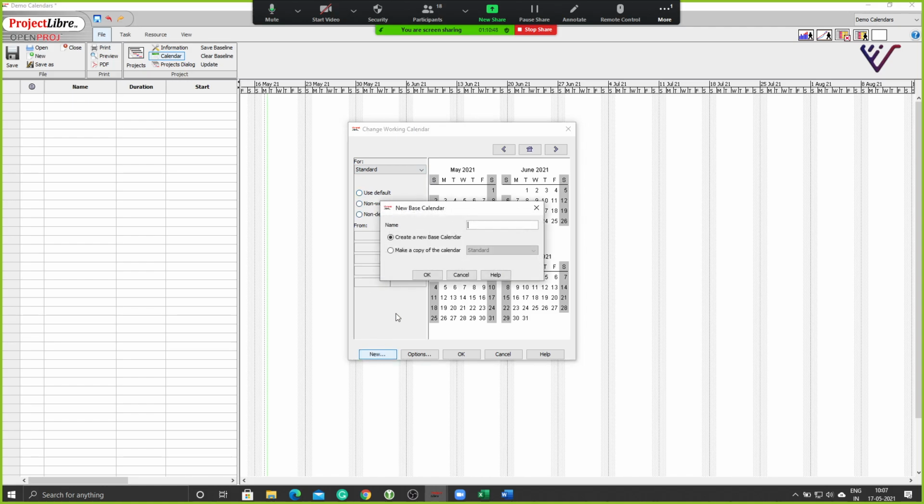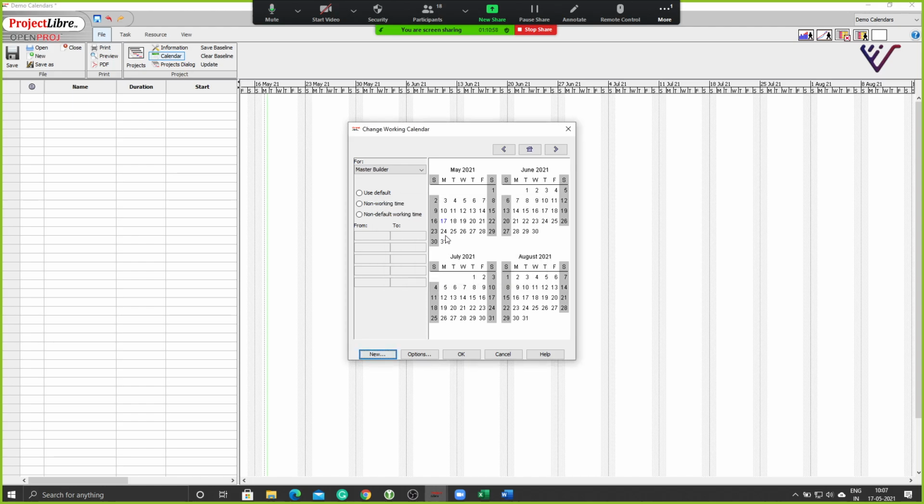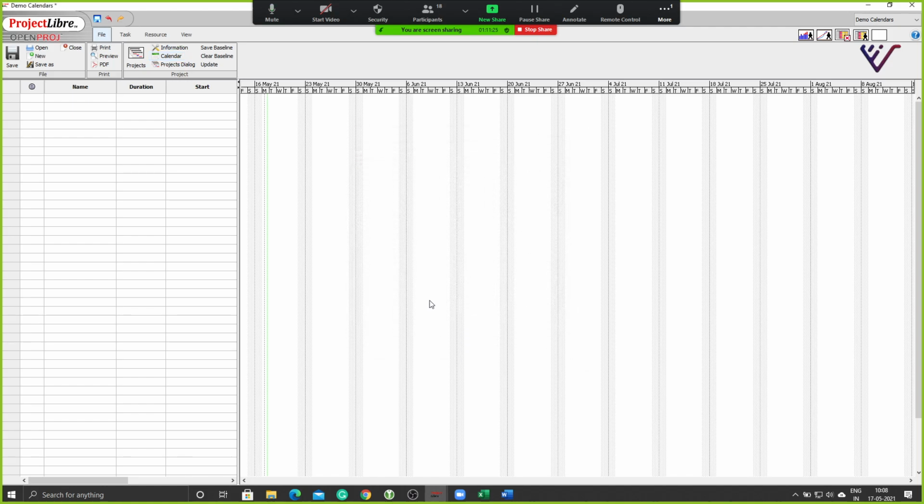I will add a new calendar, make a copy of the standard calendar, and I'll call it master builder. So this is somebody who is going to come to the site only on select days. So his work will depend on that. Now I'm going to remove him on Wednesdays and Thursdays. On Wednesdays and Thursdays, the master builder is not available at site. So that becomes the non-working time. Notice what happens here. Those days become holidays or non-working days for the master builder. So I'm going to say okay.